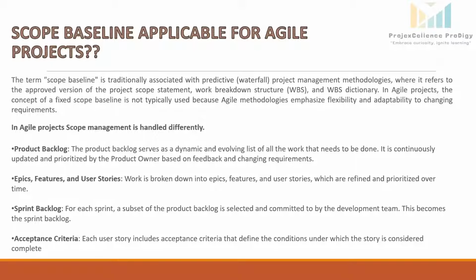Sometimes the question arises whether scope baseline is applicable for agile projects. So the answer is no. The term scope baseline is traditionally associated with predictive project management methodologies, where it refers to the approved version of the project scope statement, WBS and WBS dictionary.